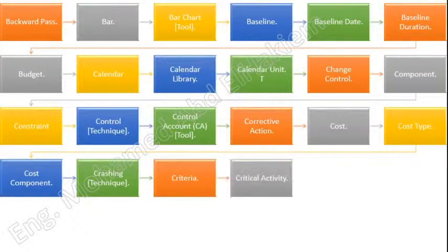Critical activity. Any schedule activity on a critical path in a project schedule. Determined by using the critical path method. Although some activities are critical, in the dictionary sense, without being on the critical path, this meaning is seldom used in the project context. Critical chain method, technique. A schedule network analysis technique that modifies the project schedule to account for limited resources. The critical chain method mixes deterministic and probabilistic approaches to schedule network analysis.